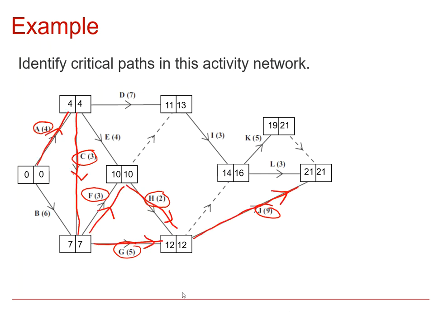And what we see here is that there are actually 2 critical paths here, because at this point we can either go from here to here to here one way, and that's all critical activities, or we could go straight across. So both those options, both the path that includes that part and that part, are critical paths, and so there's no flexibility at all anywhere along either of those paths. And so to record our answer, we will list the activities in order for those 2 critical paths, like that.